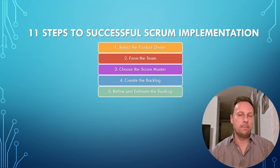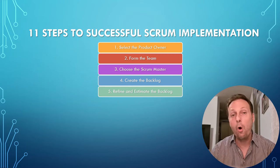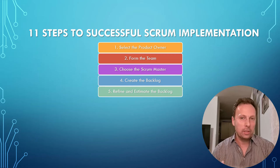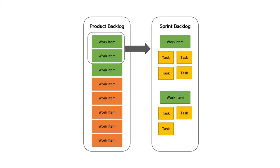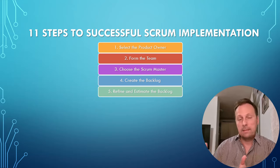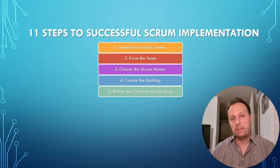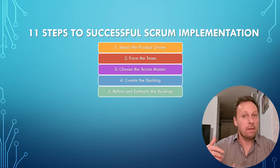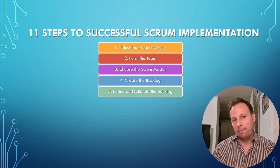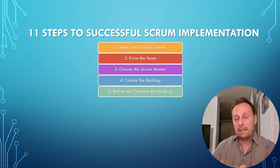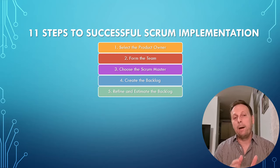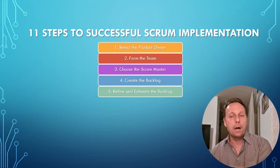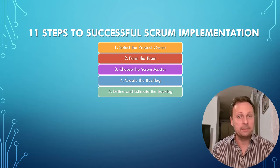Step five: refine and estimate the backlog. The key is to have the people who will actually perform the tasks estimate how much effort each task requires. The team needs to analyze each backlog item and determine: can it be done? Does it have enough information to complete it? Is it small enough to be estimated? Is there a definition of done — an agreement on the standards that must be met for something to be called done? Does it create visible value? Each item must be presentable, demonstrable, and ideally deliverable. Don't estimate in hours, as people are not good at it. Estimate by relative size — small, medium, or large — or even better, use the Fibonacci sequence.